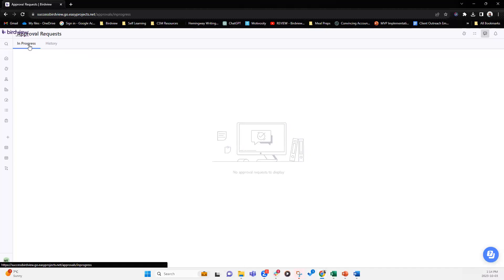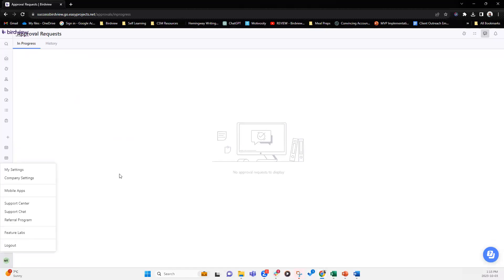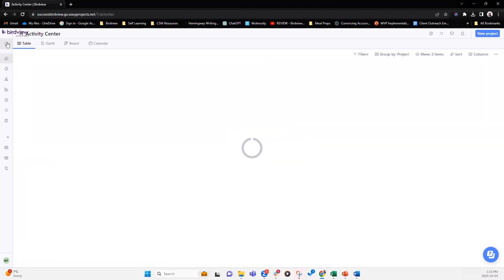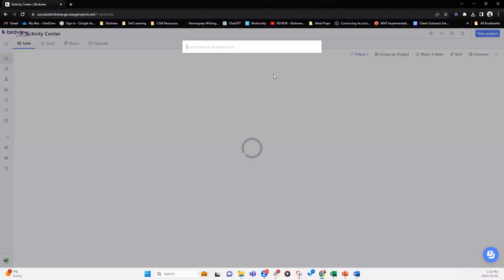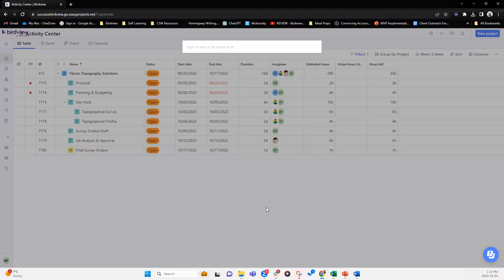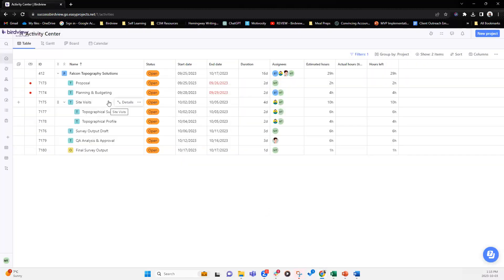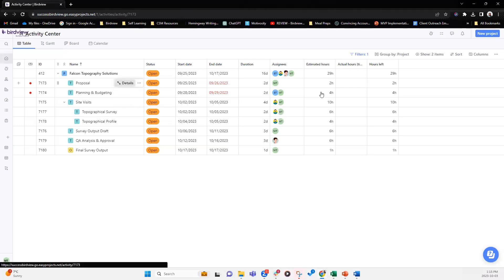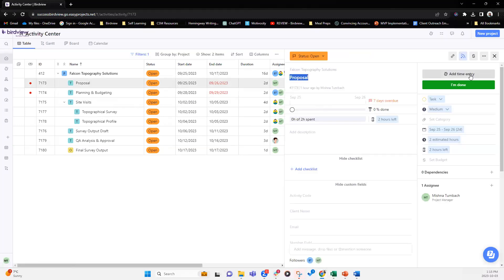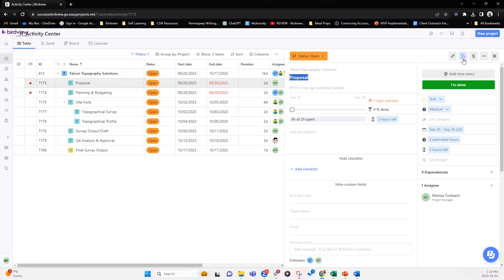So let's talk about following versus assigning activities. So anytime you are assigned to a task, you're automatically following the task as well. And how do you know if you're following a task, in the project or the activity details, you will see this little wifi icon. That means if it's blue, that means you're following it. If you click on it, it will be gray. So if you hover, it will also tell you if you are following or if you're unfollowing.